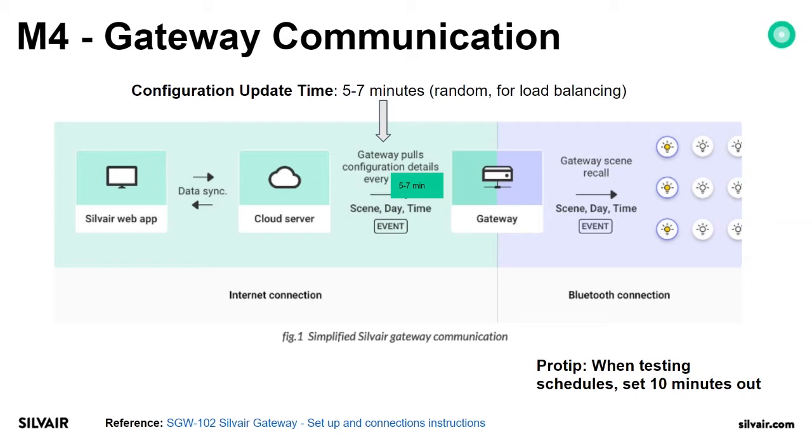It might be affected by how large the installation is and what the network performance is. Also, pro tip: when testing schedules, it's good to set 10 minutes for different schedules to be applied, especially for the first setup, so that the configuration can be uploaded to the cloud before triggering the scheduled sequence.